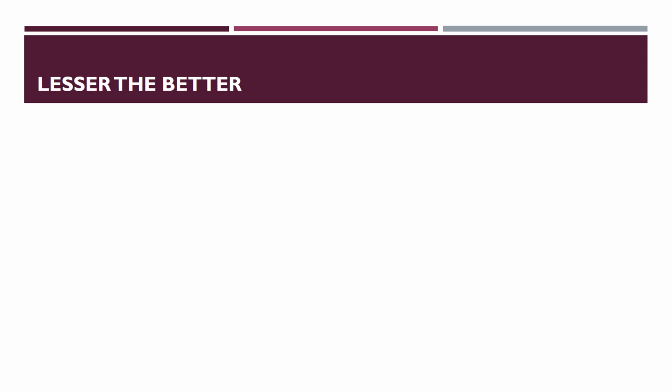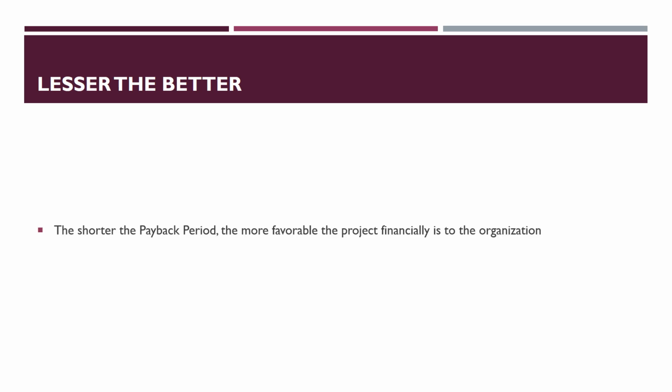So obviously you must have realized by now that the lesser the payback period is, the better it is, the easier it is to select that project. So the shorter the payback period, the more favorable the project financially is to the organization. So it's nobody's guess now that whichever project has a shorter payback period, that is the project that you should select hands down.